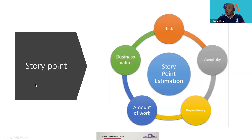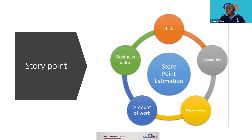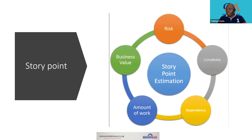So what makes up a story point? The factors considered are: the risk involved, the complexity, the dependencies, the amount of work to be done, and the business value. These are how we arrive at a story point for a particular work item. How risky is it to develop this piece of work? What is the complexity around it? Is this piece of work dependent on some other piece of work within the team or outside the team?